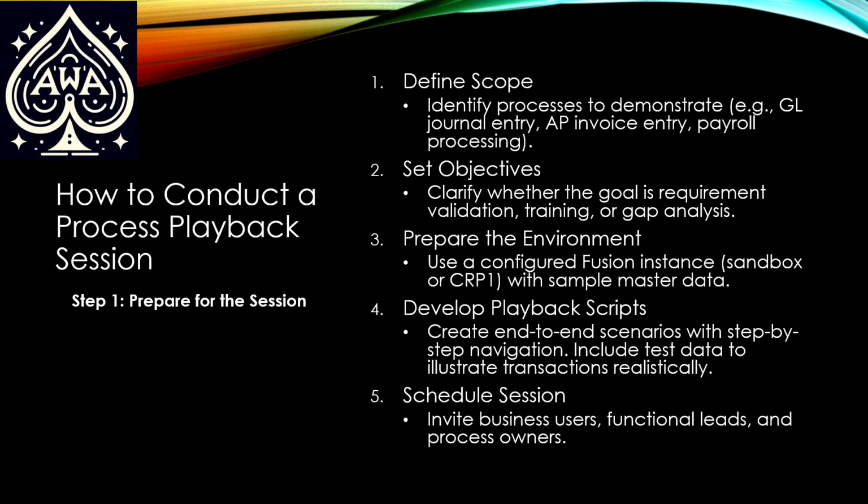If the client says, hey, can you go and use Sally Supplier? No. Let me get through the script as I've prepared it, and then if you want to see this as a separate stage, I'll take a lunch and learn. If we've got time at the end, we can go through there. But the worst thing you can do in any of these sessions is do something you haven't prepared. At best, it may work.